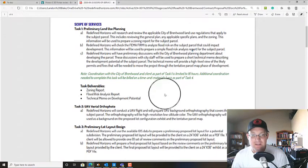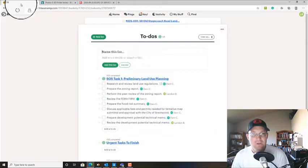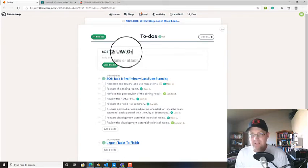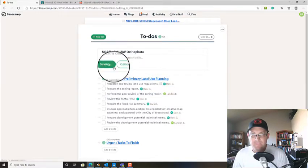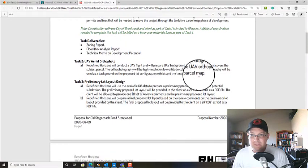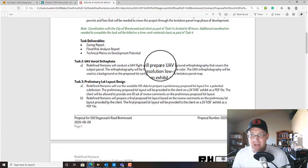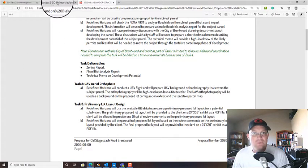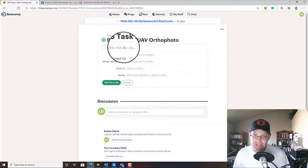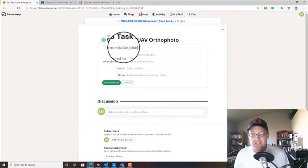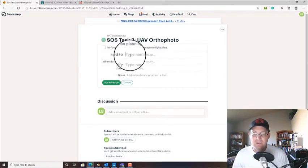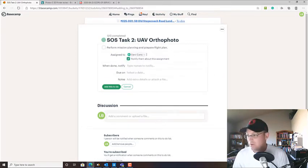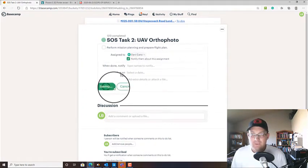So our next task on this is UAV aerial orthophoto. So we're going to say SOS task 2, UAV orthophoto. And this one will be a little simpler. So we need to prepare a high resolution, low altitude color orthophoto. So now we've got to break that down a little bit. We're going to perform mission planning and prepare flight plan. And we're going to give that to Danny.